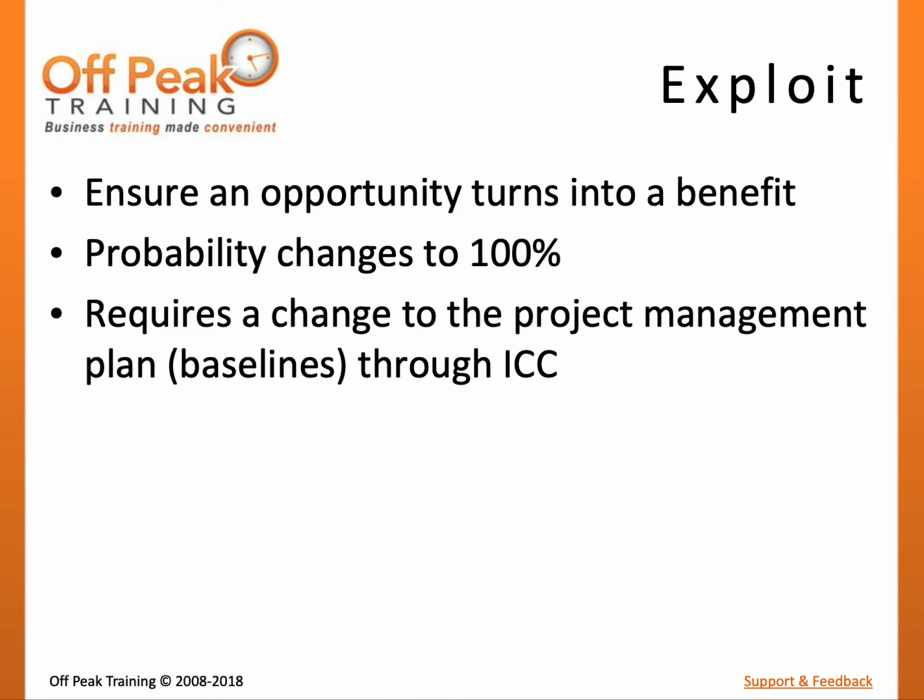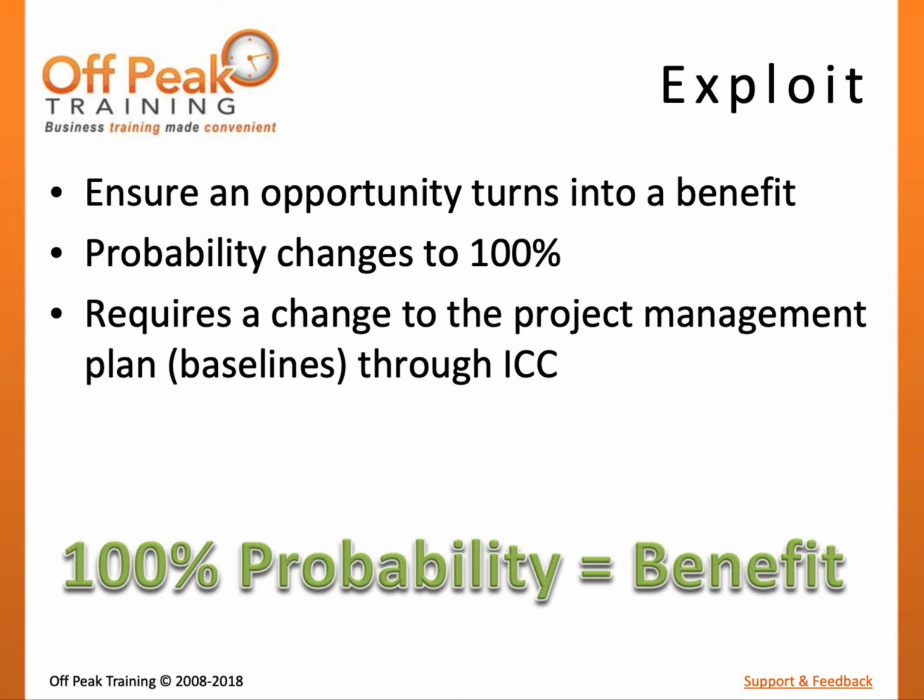Much like avoidance, this will typically require some type of major change to project scope or other objective. For example, if our project has identified the opportunity to qualify for a financial incentive for obtaining certifications in green building, we can exploit the opportunity by completing training and certification to ensure the opportunity will be actualized.